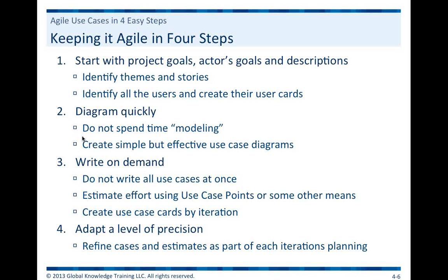And then when you actually start writing your use cases, you write on demand. So we don't start writing our use cases wholesale. We actually start writing the use cases that we need to write when we need to write them. So this is in keeping with the just-in-time concept.